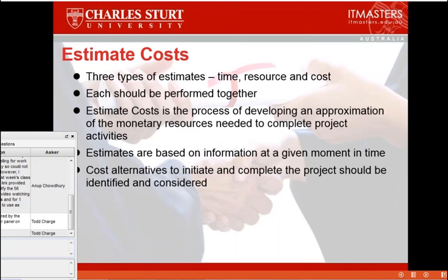So when you're estimating costs, one of the things that is important in project management costing is the concept of life cycle costing. Life cycle costing looks at the overall cost of a product or whatever you're producing from your project, and it looks into the future. Once we have developed this product and it's in the marketplace or has been used, what are the costs of maintaining and keeping that product going off into the distant future? So for example, if you're going to build a road, do you put tar macadam on the road that needs to be repaired and maintained every 2 years, or do you build a concrete road that you don't need to maintain for 20 years?